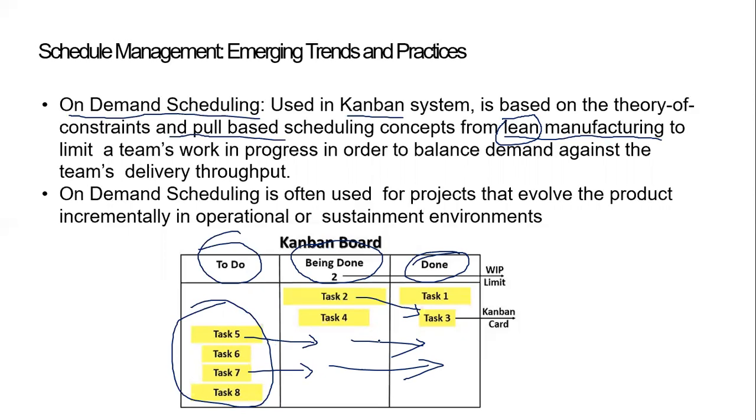It's a very interesting concept. One thing, there is something called a WIP limit. Let's say we are 4 people in this team, right? In my team, I cannot have 10 cards here. That is not going to be possible, because I can work on one task at a time. The best practice is that you should not have many cards in progress, otherwise you're not getting anything done.